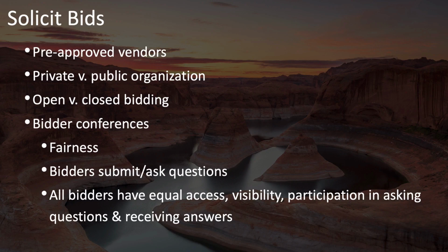However, it's important to make sure that anytime any questions come up and you answer them, that everybody gets an opportunity to hear those questions and answers. If your process allows for people to email in questions later after the bidder conference, then you need to make sure that you distribute the question and answer to everyone.